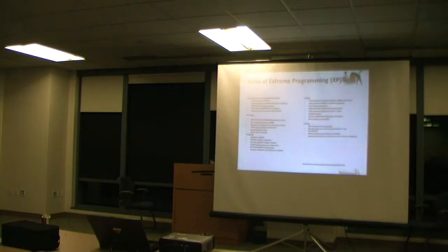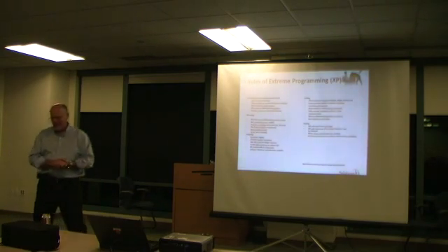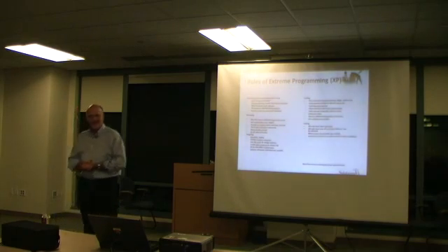Yep. So if the team is so busy doing stuff that they forget to check off the tasks, we don't care. And we use a binary system. Either it's done or it's not. There's no half done, there's no half points, there's no nothing. Yep. Either you get the points for the completion or you get totally zero. Agree. That's the beautiful thing about this. It's either done or not done.